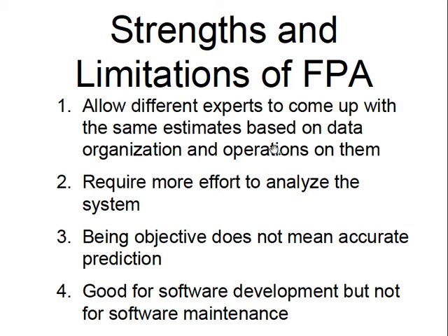So we'll show very shortly that it allows different experts to follow the same method, and they will come up with the same estimate. So in that sense, it is objective. It's no longer subjective to who is doing the estimation. So that is the main strength of function point analysis. But the drawback is it requires some effort. More work needs to be done before you can come up with the estimates.